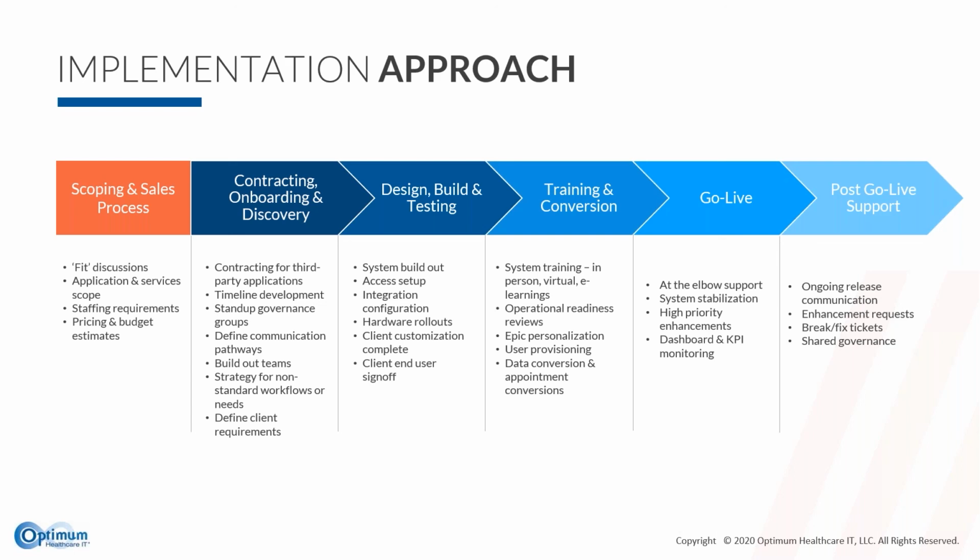But also then you move into the meat of really discovery and figuring out, okay, for this client, what do we need to build? Or really, what do we need to customize for this client? Because again, we're not starting from a baseline of zero and designing from the ground up. We're starting within a framework of what we are willing to customize as part of our Community Connect program. But understanding how we are customizing those standard build items. And that's where that standard documentation is really helpful, so that you can have discovery questionnaires and checklists that will collect the information that then you'll be able to use to really define the build, the customization that you need to do for them. You can also, obviously, you'll want to have standard project plans.